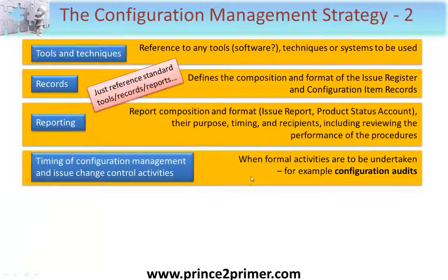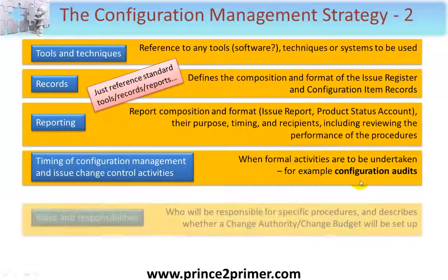Timing of configuration management and issue change control activities. This will lay down when any formal activities are to be undertaken. I mean, let's face it, an issue is something which normally arises as something that you weren't planning for. So it would be pretty difficult to actually say when you intend to do this. But configuration audits would be an example here of something that you would want to plan for. Normally at the end of every stage, and certainly at the end of the project, although, as I mentioned earlier, there may be some key milestone points during a stage where it would make sense to hold configuration audits.